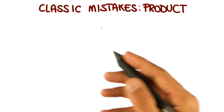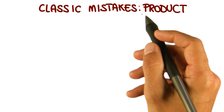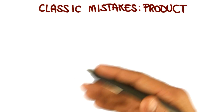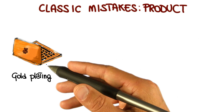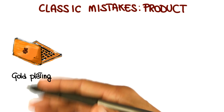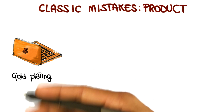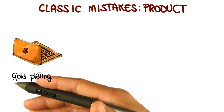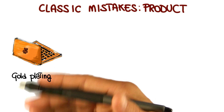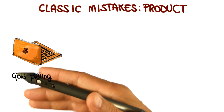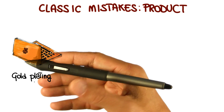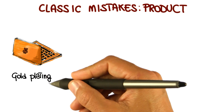The third category of mistakes I want to mention is product-related mistakes. A typical example is gold plating of requirements. This means that it's very common for projects to have more requirements than they actually need. For example, marketing might want to add more features than the ones actually needed by the users, and having more requirements lengthens the project schedule in a totally unnecessary way.